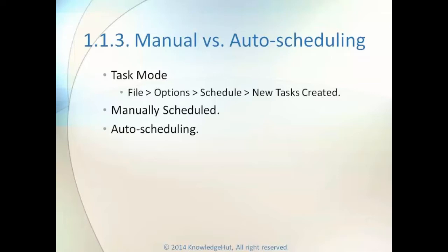In the auto scheduling mode, users are not permitted to enter anything other than what the field is ultimately formatted for, and Project includes and takes control of the task date calculations, respecting logical links, etc. By default, Project 2013 is set to manually scheduled mode.